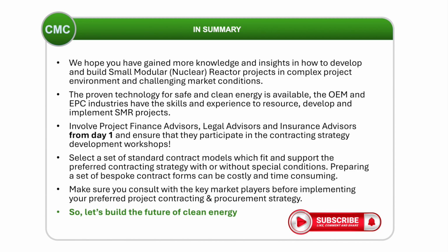Involve project finance advisors, legal advisors and insurance advisors from day one and ensure that they participate in the contracting strategy development workshops. Select a set of standard contract models which fit and support the preferred contracting strategy with or without special conditions. Preparing a set of bespoke contract forms can be costly and time-consuming. Make sure you consult with the key market players before implementing your preferred project contracting and procurement strategy.